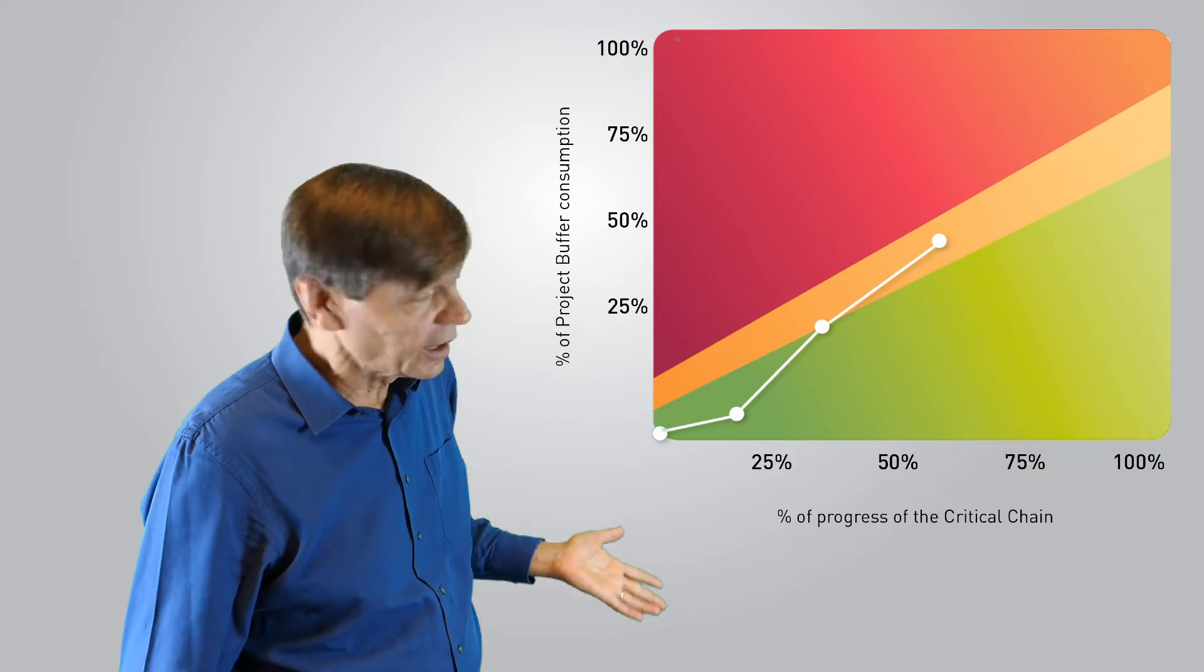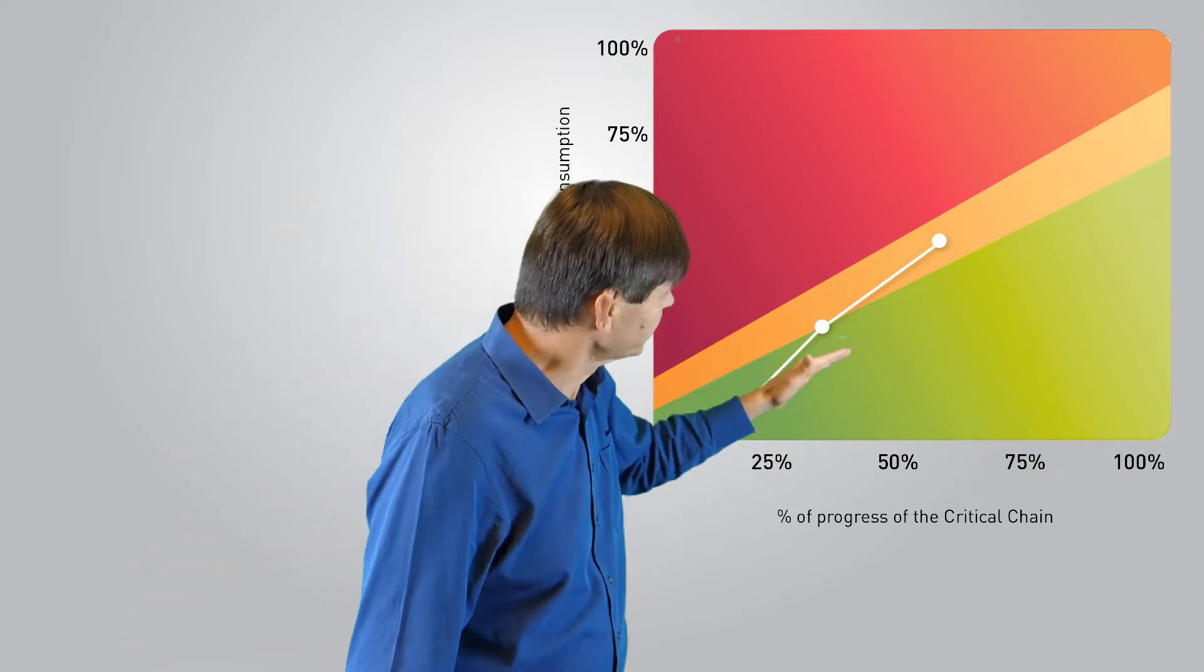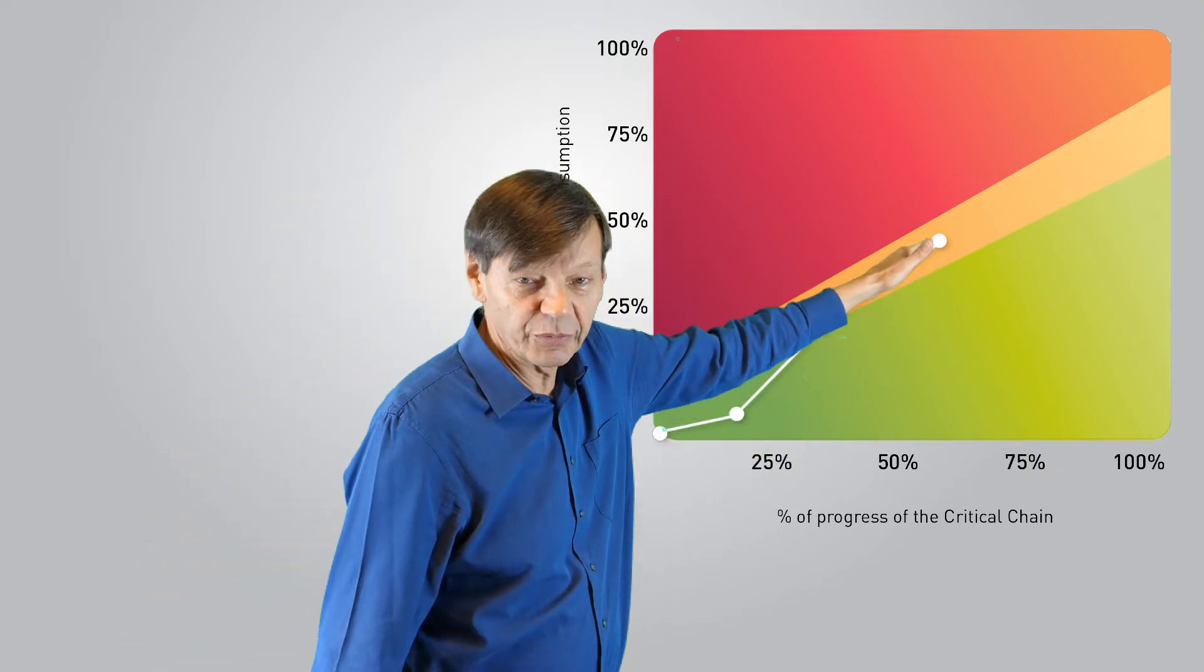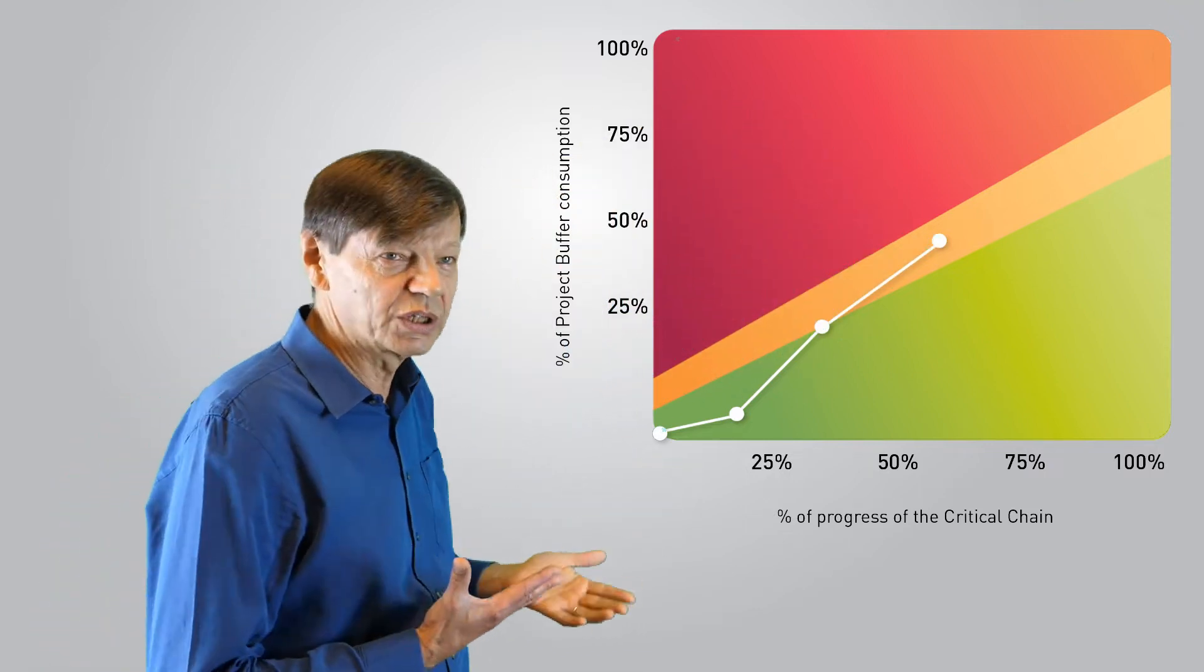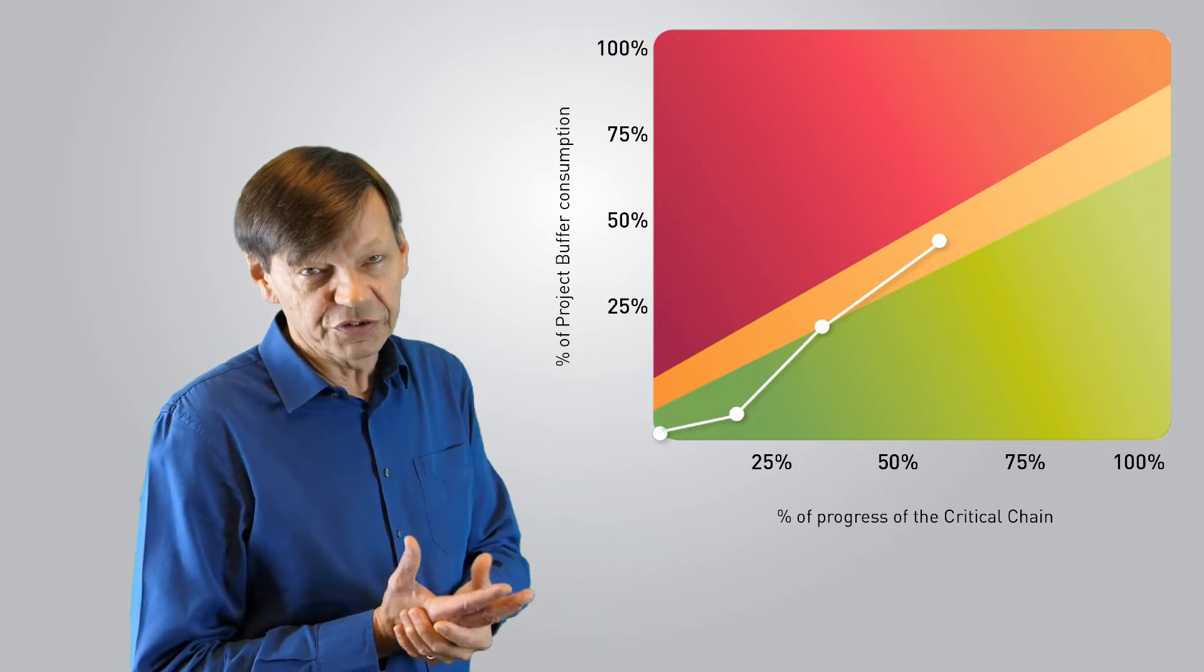So you have these fever charts, and if you have the fever chart of a project that's halfway done, the execution will stop somewhere up here in the middle. And you have all these different fever charts—individual ones of healthy projects with a good probability of each of them finishing on time or early.